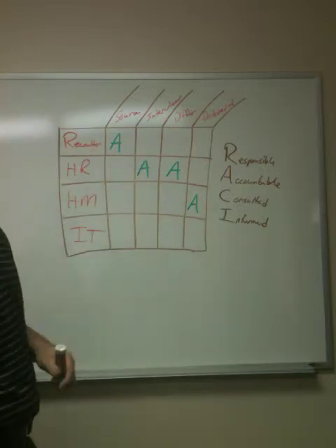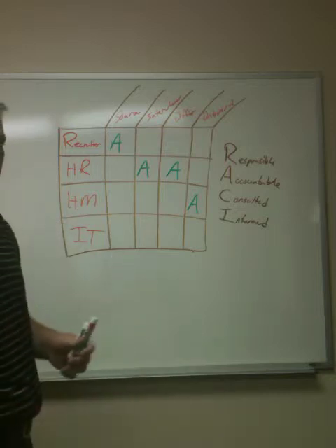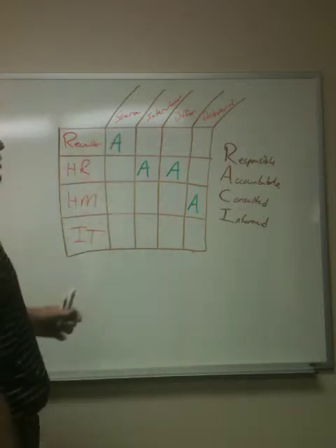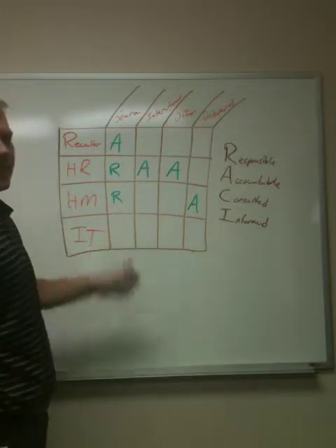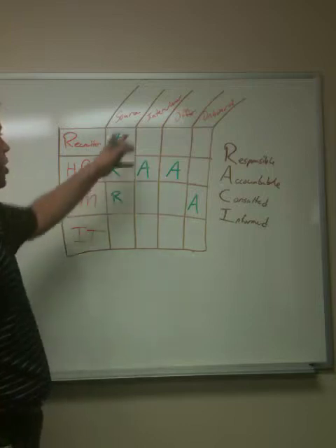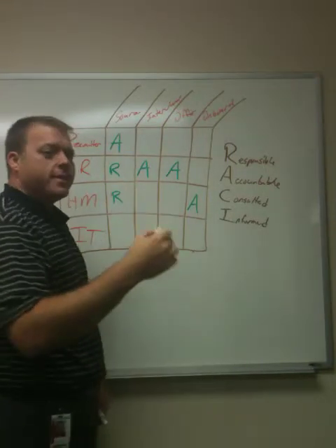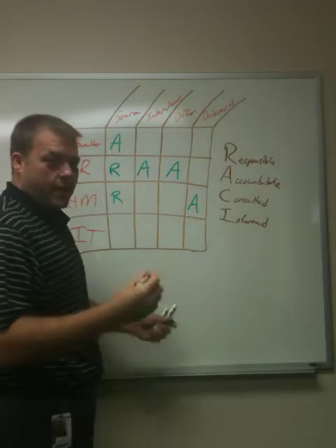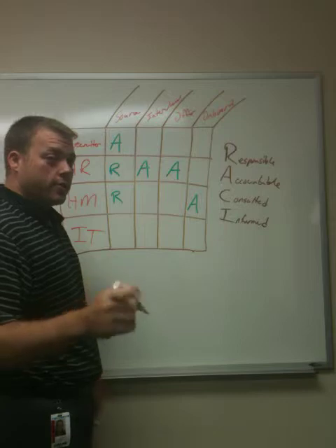But of course, that person doesn't do all the work themselves, right? So now we talk about responsible. Who else is responsible for doing this work? So for sourcing, HR has a role to play, the hiring manager has a role to play. IT is not really involved at this point. For the interview, the recruiter might be part of it. For this example, let's say they're not. They source the candidates, hand them off to HR. So they're not really involved in this piece, although we do want to let them know before we start.